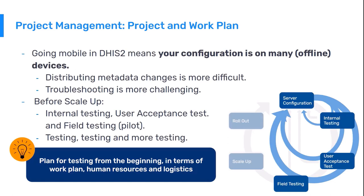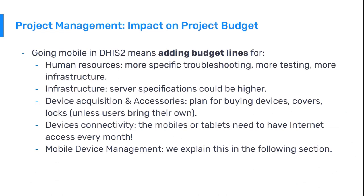The duration of the testing cycles will depend on the nature of each phase. Going mobile on DHIS2 will also have budget implications, and it's important to define them at the beginning of the project to avoid problems. From the human resources perspective, it should include additional costs related to troubleshooting, configuration, and testing. Server specifications might need to be increased due to load peaks when having a large number of devices. In general terms, mobile devices are likely cheaper than desktops or workstations, but the number of devices will probably increase, and they might need to be purchased with accessories.